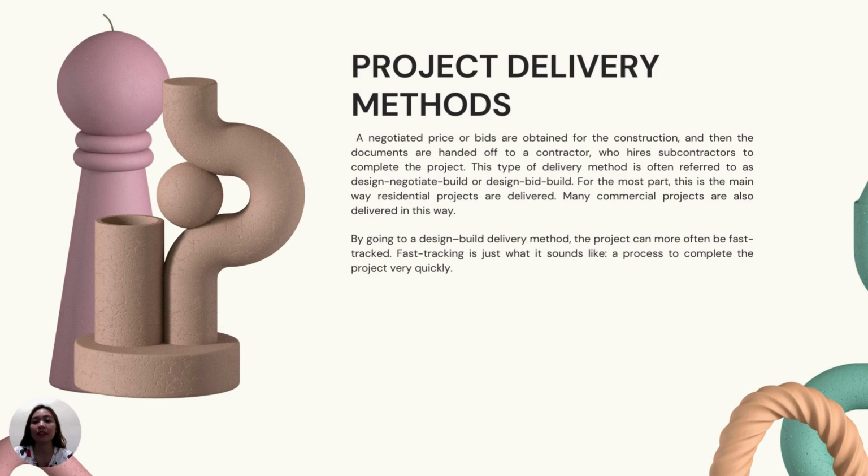Project delivery method. This type of delivery method is often referred to as design negotiate build or design bid build. For the most part, this is the main way residential projects are delivered. Many commercial projects are also delivered in this way. Another type of delivery method is often referred to as design build, and by going to a design build delivery method, the project can more often be fast-tracked. And fast-tracking is just what it sounds like, a process to complete the project very quickly.